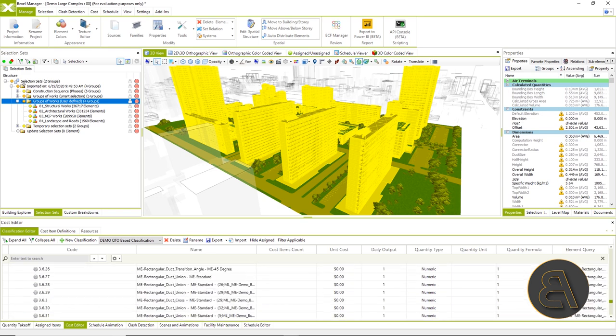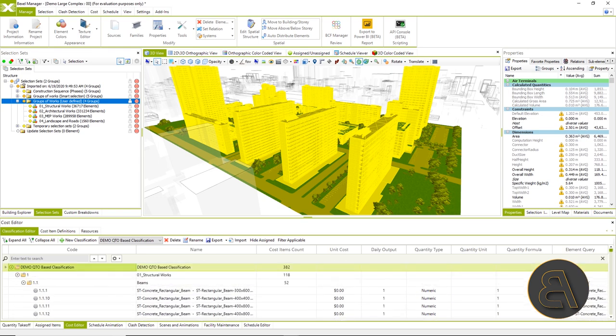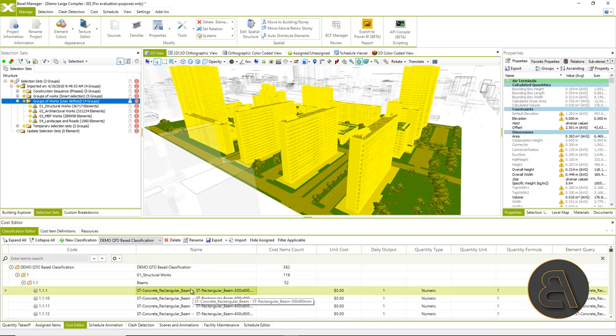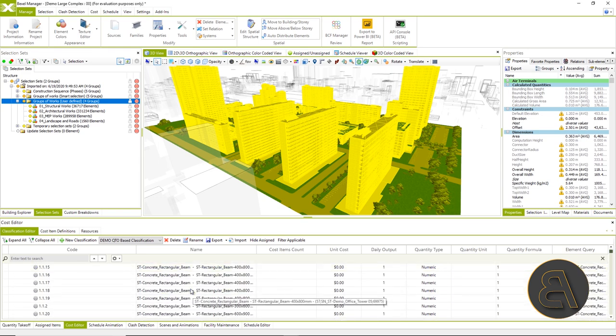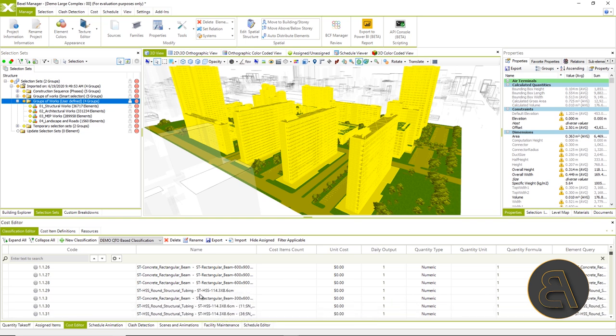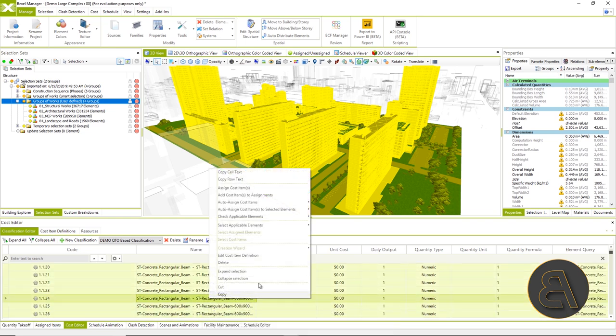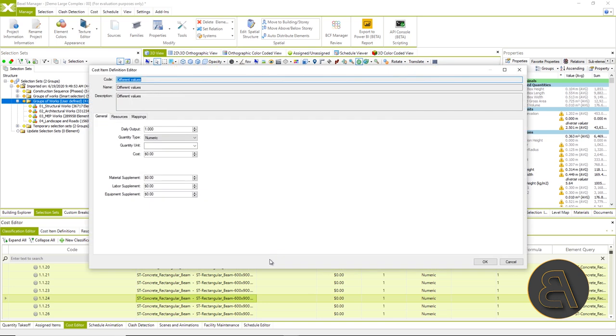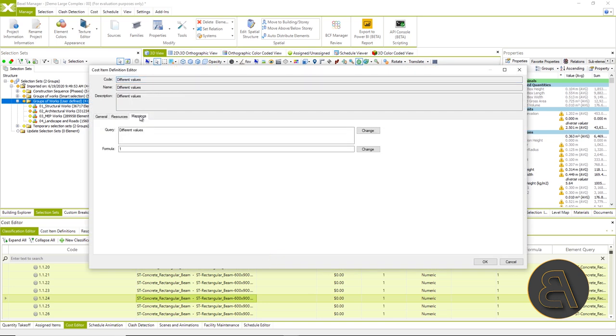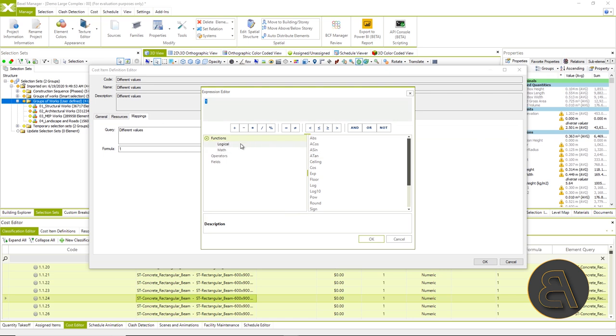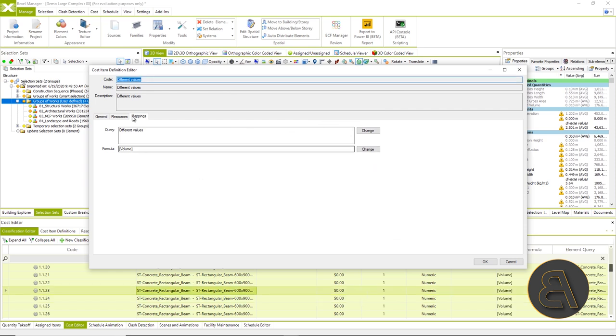Now the principle of changing the settings can be done directly by selecting the cost item and changing the cost item definition. We will select several concrete beams and change the parameters within the cost item definition. We will change the formula to volume, quantity type, and unit.